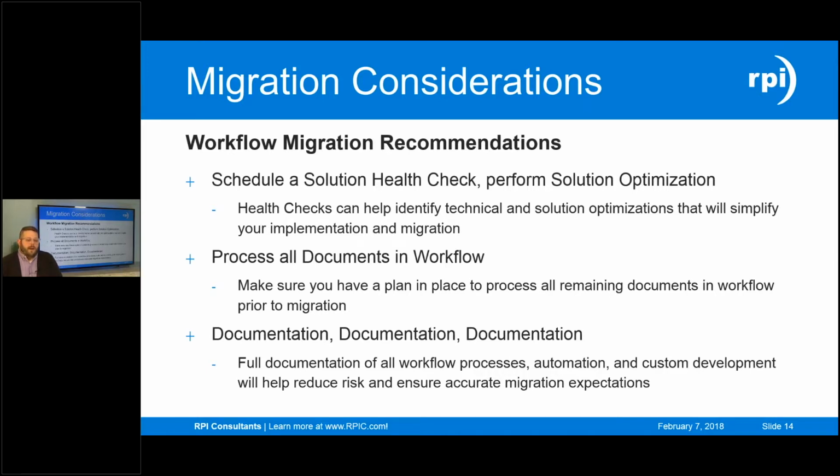Third recommendation is absolutely be sure you have your documentation in order. And what I mean by this is mostly being sure that you have a written version of your workflow. This is generally a series of Visio diagrams showing your business process end to end, how users interact with the system, and that includes all of your routing rules and iScripts. What are the decision points? Because if we have all of that documented, it's very easy to translate that into a design document for OnBase.